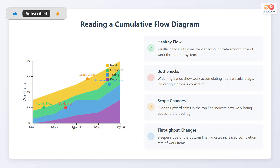Let's learn how to read a cumulative flow diagram. Parallel bands with consistent spacing indicate smooth flow of work through the system. Widening bands show work accumulating in a particular stage, indicating a process constraint. Sudden upward shifts in the top line indicate new work being added to the backlog. A steeper slope of the bottom line indicates an increased completion rate of work items.